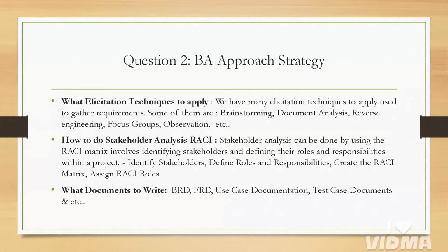First of all, before the project initiation, we will conduct different analyses to understand the strengths, weaknesses, and everything regarding the organization. We conduct enterprise analysis to understand the business needs, and we conduct SWOT or gap analysis and a feasibility study, to see whether we can deliver the product to the client within the timeline and budget or not. These things are all done before the project initiation.